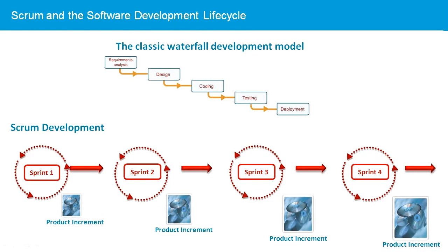Scrum is based on an iterative approach to the software development lifecycle. In Scrum, the project is broken up into development units called sprints. The sprint is a time-boxed iteration of the complete software development lifecycle. The sprint includes planning and analysis, design, development, test, and delivery of the product increment to the customer. The product increment is potentially shippable software that contains the highest priority functionality of all the requirements in the project.